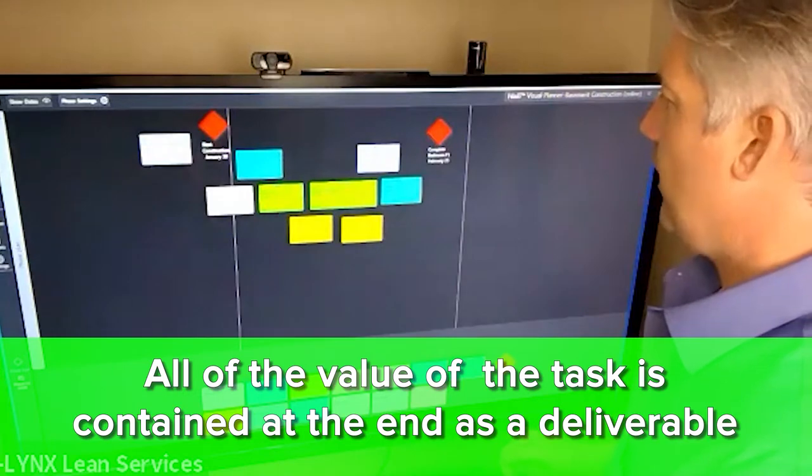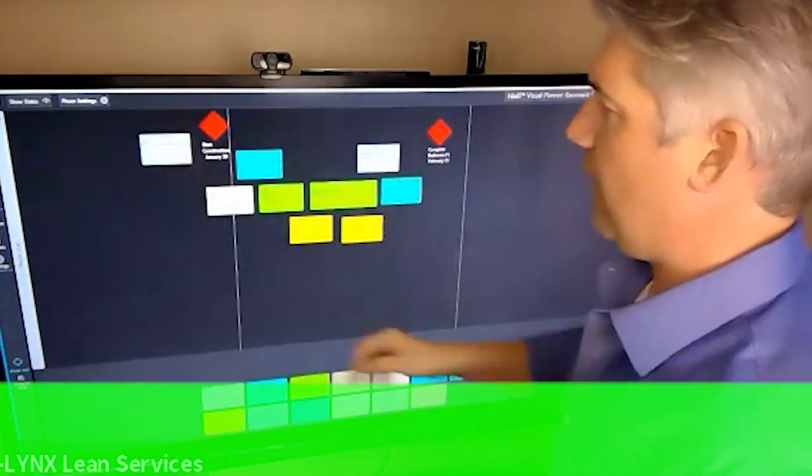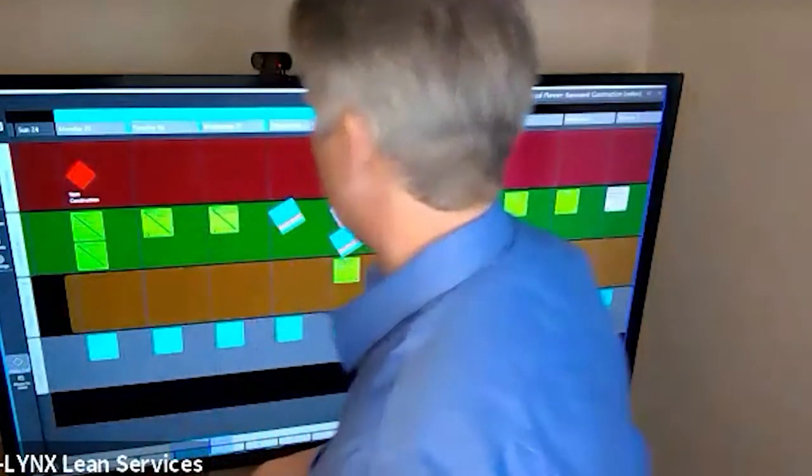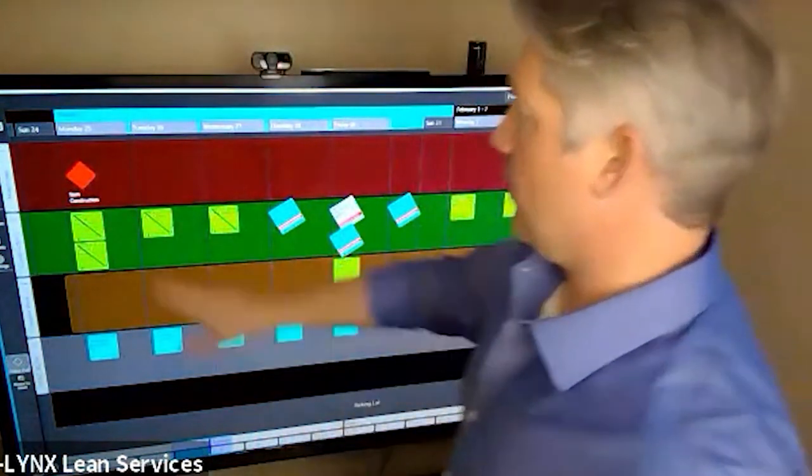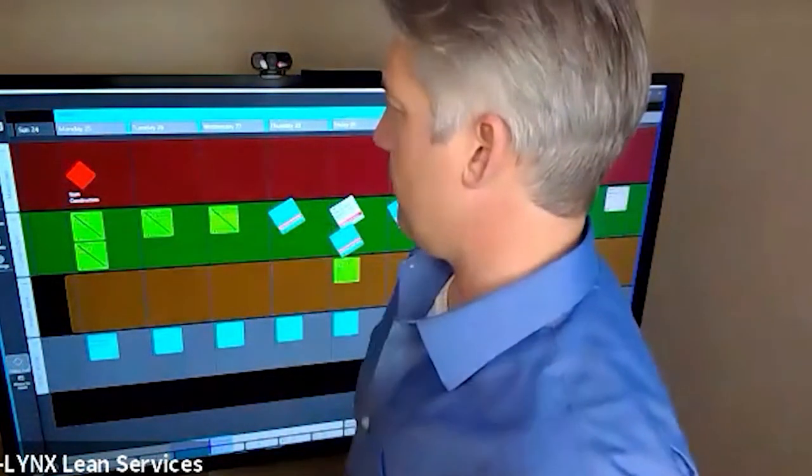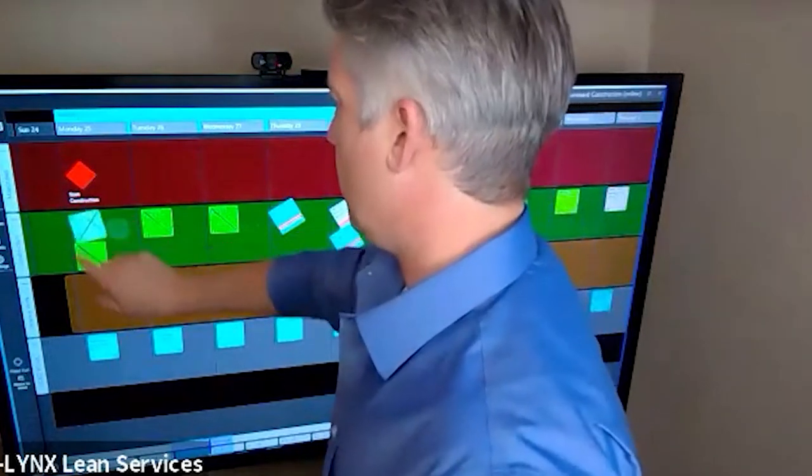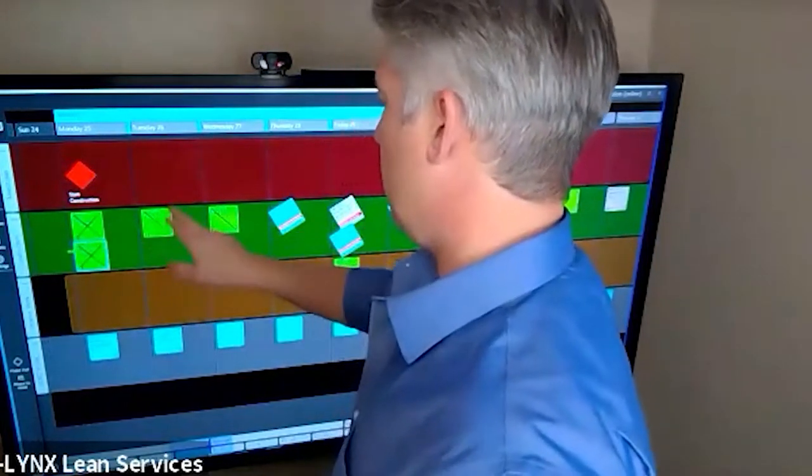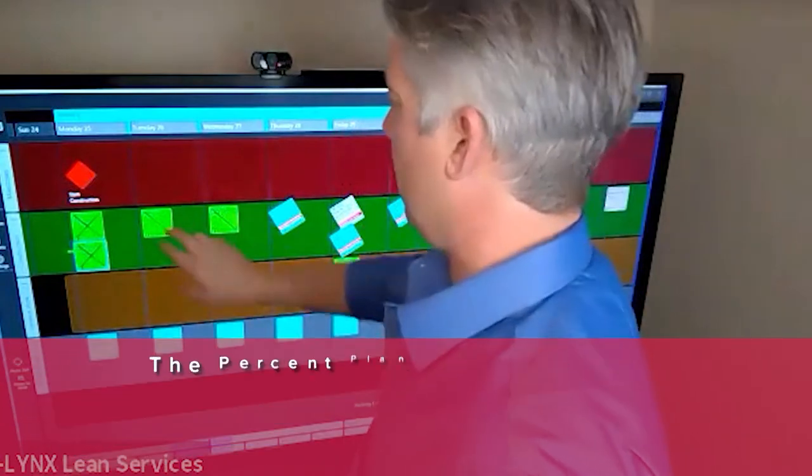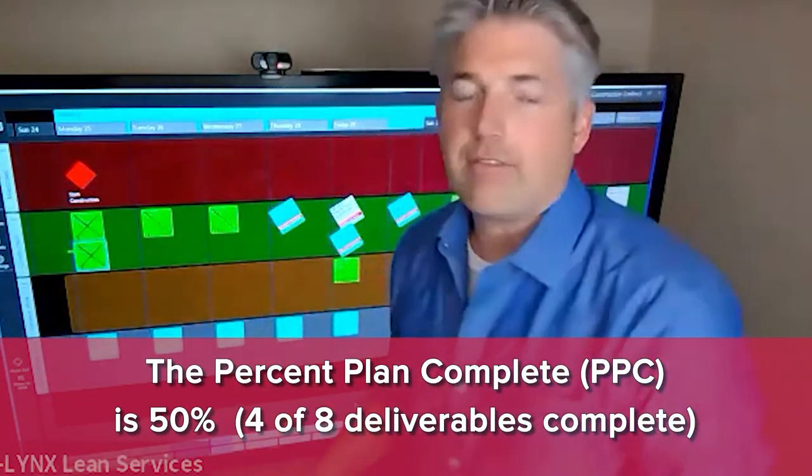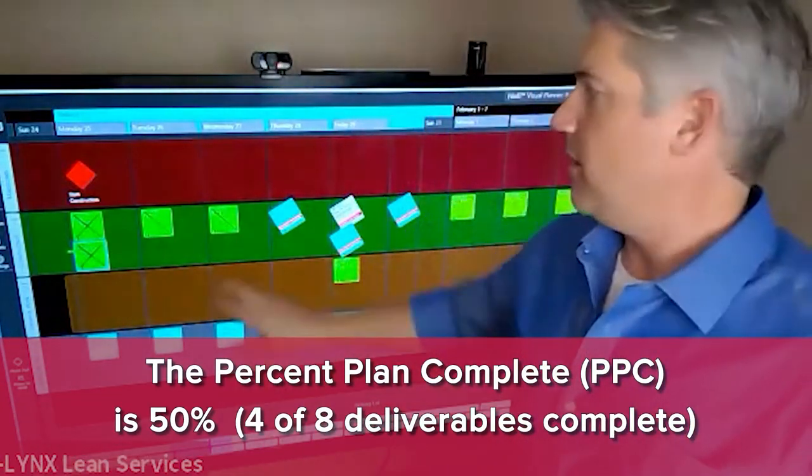In week one, Eric had eight deliverables and he accomplished four of them, which makes his commitment to me and himself 50% reliable. So we call that a commitment reliability index, or as it's known in the industry, PPC - the percent planned complete.